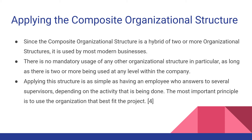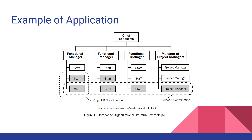On the next slide, an example will make this easier to understand. Imagine the state government Department of Transportation has a maintenance division, which seeks to maintain the level of service of the state's roads and bridges, and a capital projects division, which builds new roads and bridges. The maintenance division and the capital projects division are located side by side, reporting to the executive. This is a composite organizational structure.